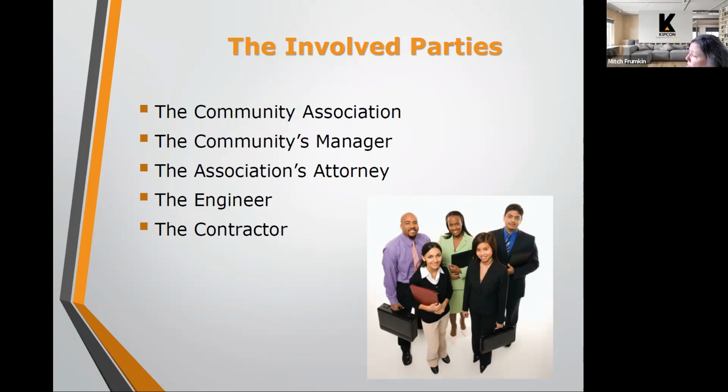The association's attorney also plays a role in the project, in that there are contracts to be reviewed. There's a contract between the association and the engineer, and a contract between the association and their contractor. So those contracts would typically get reviewed by the association's attorney, and then the contracts between the parties would be completed.